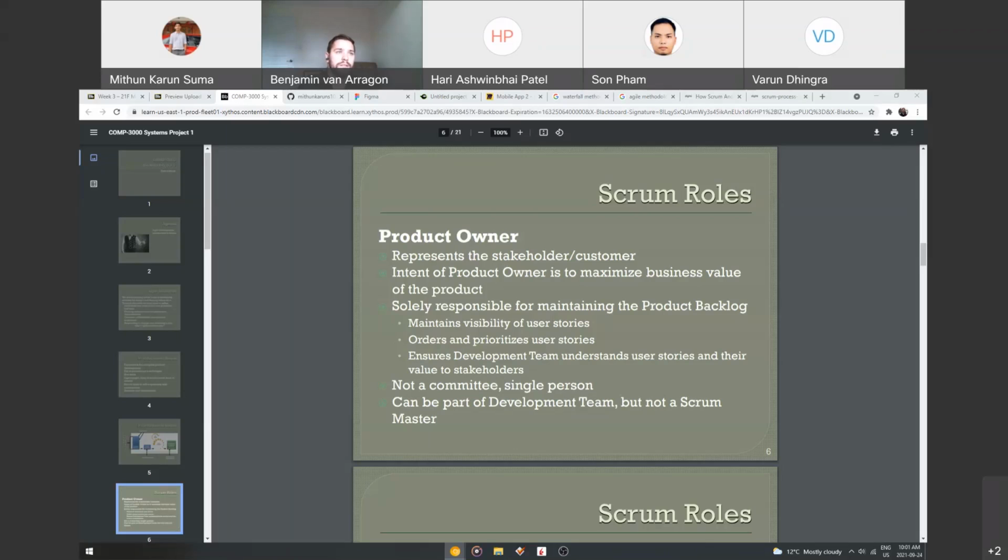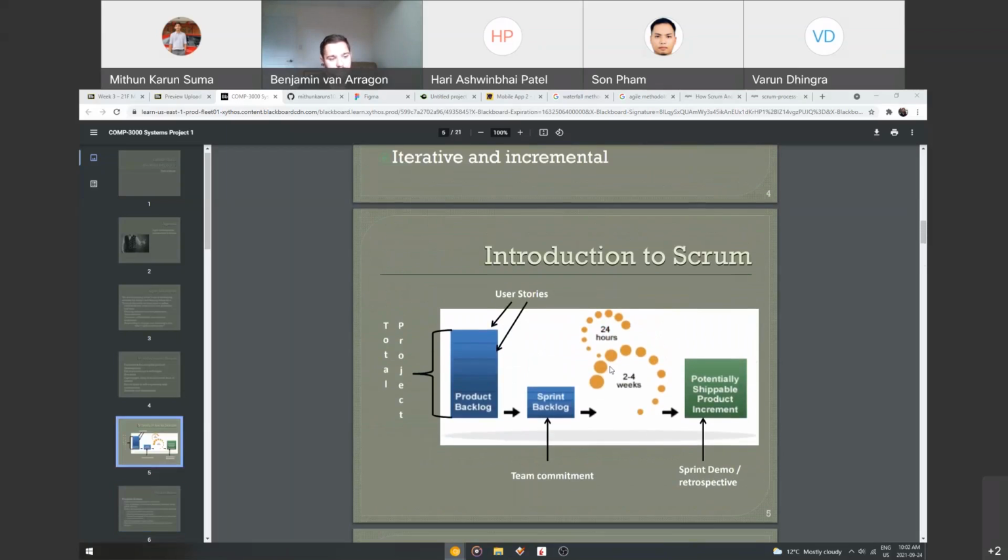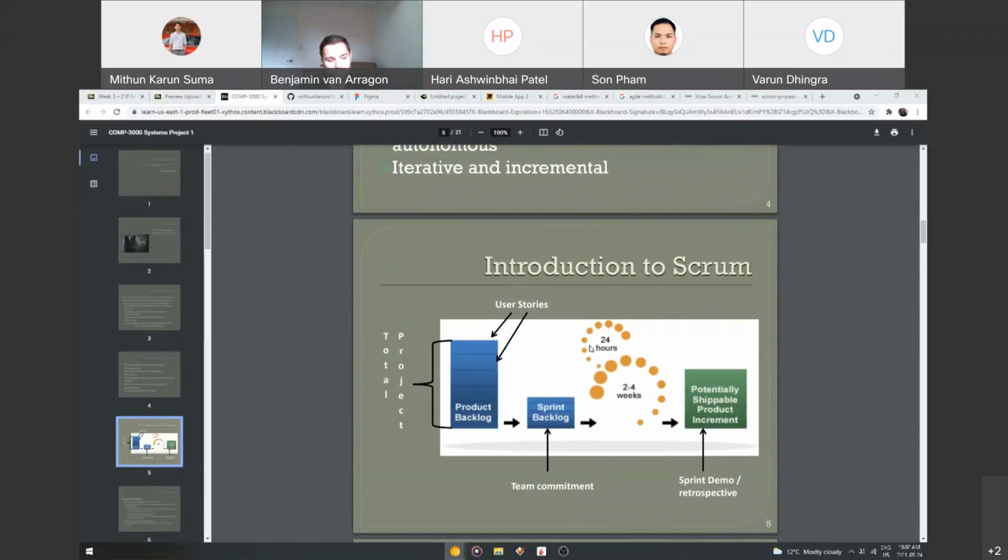I see what you're saying. So basically, there may be times when you develop something and then you figure out a better way to do it, right? But that's actually better in a sprint methodology versus a waterfall methodology, because here you do some of this work and you get everything working and finished. And then as the customer, I can tell you whether or not I like the login method at the end of 2 weeks. And if I say I don't like the login method, I want a fingerprint scan, then that next sprint after 2 weeks, you guys can change it and it's fresh in your mind.